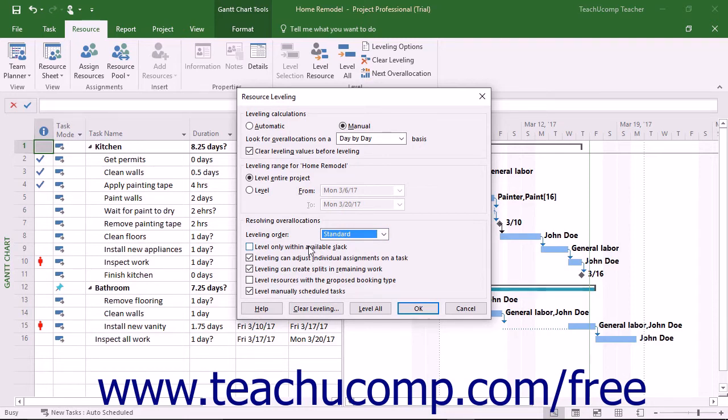Often, there is not enough free slack in a project file to allow for resolution of overallocated resources without extending the finish date.